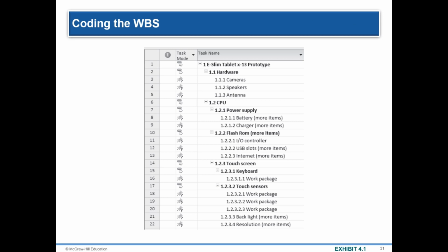So note the project identification is 1.0. Each successive indentation represents a lower element or work package. Ultimately, the numerical scheme reaches down to the work package level, and all tasks and elements in the structure have an identification code. The cost account is the focal point because all budgets, work assignments, time, cost, and technical performance come together at this point. This coding system can be extended to cover large projects. Additional schemes can be added for special reports.